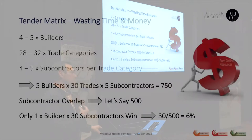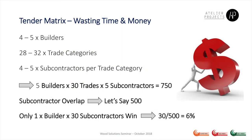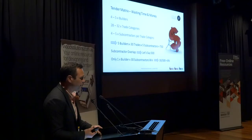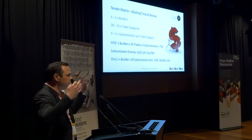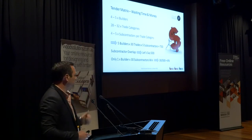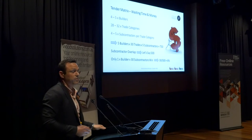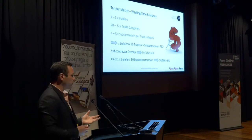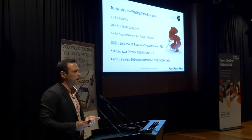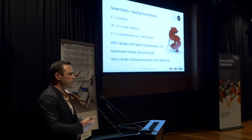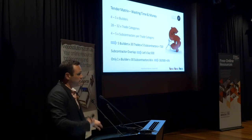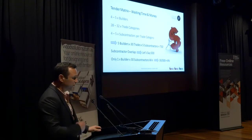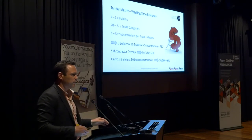This is why when builders are tendering jobs and computer systems flood the whole market with drawings asking everyone for tenders, very few subbies actually spend much time on it. They're getting called from this builder plus maybe two others, plus every other tender out there — just inundated with requests to quote. They're just trying to pump it out: do rates, get it out there. They're not looking for efficiencies during that process, and they're only winning a very small percentage of it. Would you invest the time and effort? And it's costing them money — all the subbies and suppliers running huge estimating departments just pumping work out. Someone has to pay for that. It goes onto the bottom line, it goes to the cost of the product. You can see this enormous mess of the matrix, which really costs a lot of time and money.